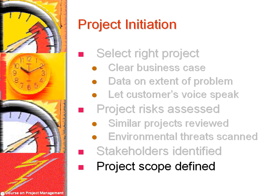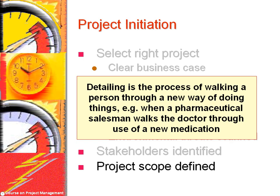The project scope should be defined and documented. Since many people are involved, communications about the scope of the project should be clear and should not be left to paper communications alone. Various employees should be detailed. Detailing is the process of walking a person through a new way of doing things — for example, when a pharmaceutical salesman walks a doctor through the use of a new medication. Everyone pretends that the project has been completed, and in this make-believe world, questions about the scope of the project are fully answered.